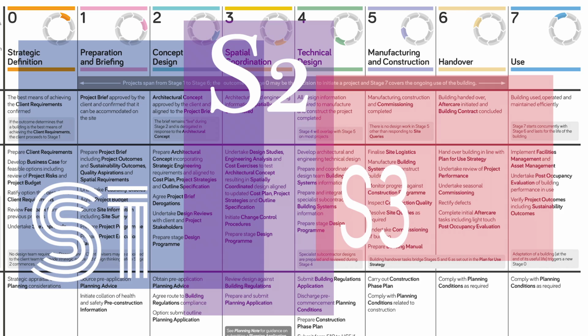S3 brings together RIBA stages 4, 5, and 6. As soon as the contractor notifies us with a small change in the model, we automatically update the model so that by the end of the project, we already have our as-built drawings. We have our technical design. We do develop the entire set of BIM components. Depending on the component, we increase or reduce the number of details by being able to script dynamic components. We even create the database architecture in order to create a data flow, a later stage for in use.